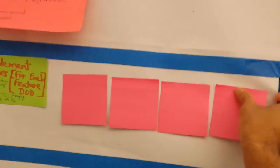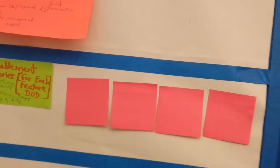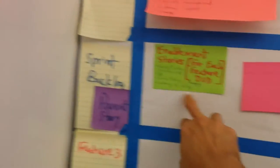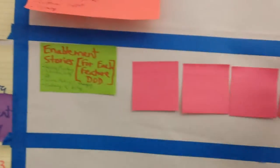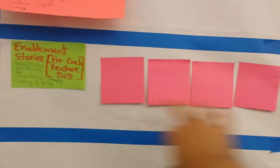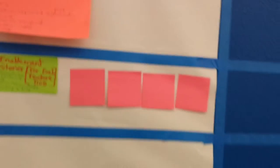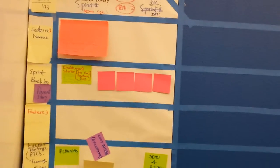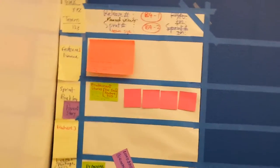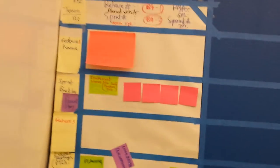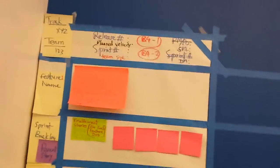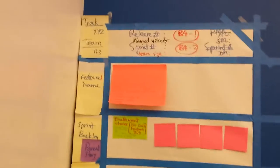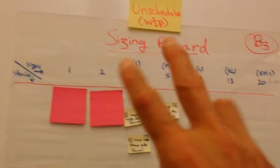We will not have overlapping allowed. We cannot have stories stacked like this—there's no way you can plan anything with that kind of approach. You've got to have stories one below the other or one next to each other. Looks like you can have six per sprint, and that's about the right size. You should not plan more than five to six stories at any point in time so that team members feel comfortable to finish them.